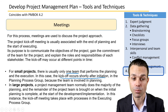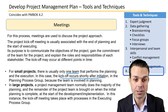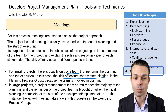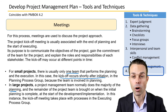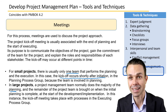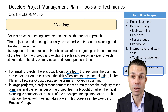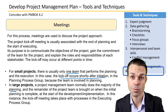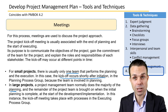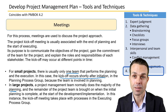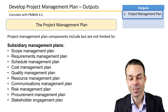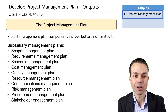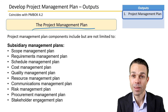For small projects, it's usually just one team that performs the planning and execution, and the kickoff occurs shortly after initiation with the whole team involved in planning. For large projects, the project management team normally does the majority of the planning and the remainder of the project team is brought on once that planning is complete.